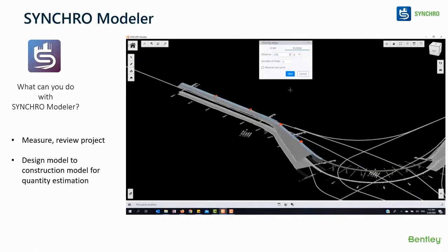So here I am giving multiple slicing, giving a distance which can be constructible, and dividing the slice. So what is happening? I have this information that these 5 slices have to be cast in 5 different days, so that I could attach that schedule here.